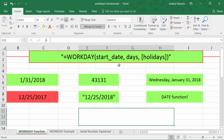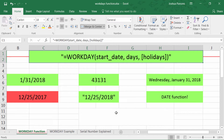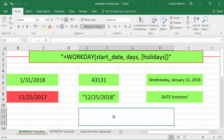The Workday function starts with a start date — give it a date and give it some days, and it will tell you what is the end of that period, excluding weekends and holidays. So basically, if you have a project that takes 10 days, it will show you the end date of it.